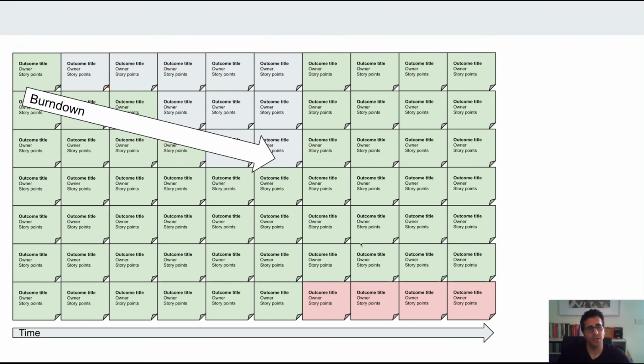So you can really use the burn down through the sprint. You wouldn't do it every single day, but certainly at the halfway point, and go, hang on, I'm going to do something here to make sure we deliver the high value stuff. So that's burn down charts. They would normally look as a graph, but I think the demonstration with the cards works quite well.